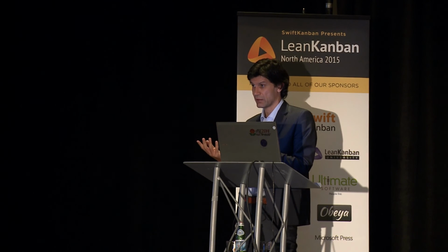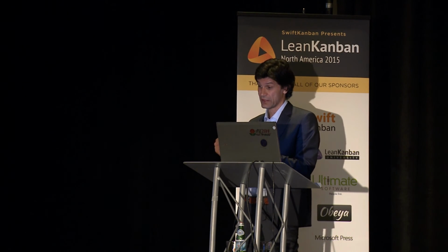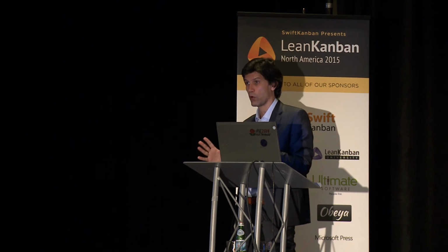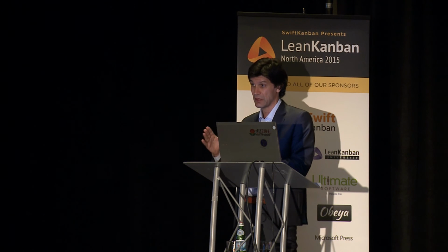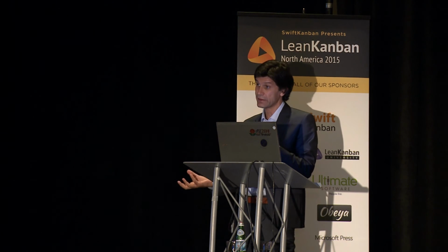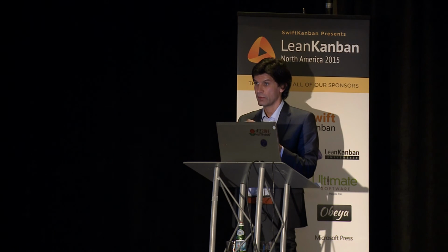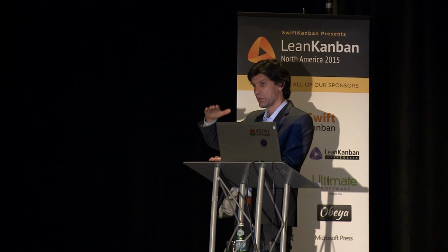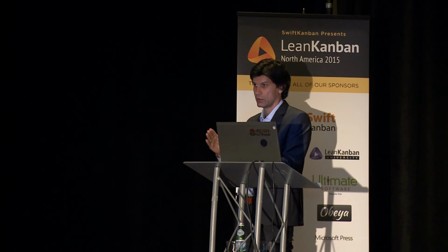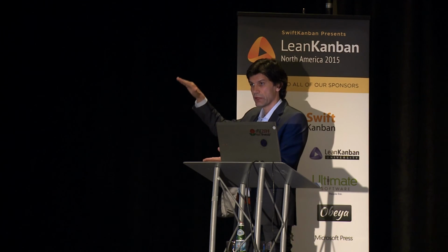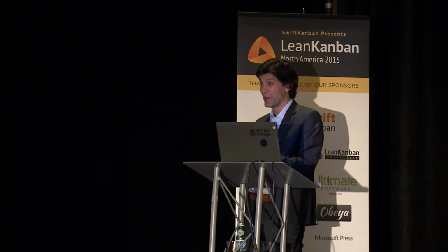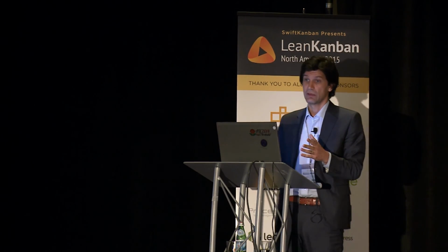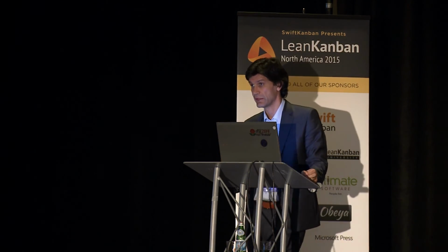Depending which is faster, right? In my practice it could be faster to analyze this epic alone. I break it down into user stories, then into acceptance tests, and then just add the new numbers, the new part of the scope, to the estimate. In this case, the estimate grows, not linearly, but it grows a bit, right? So we have the estimate as our baseline, and on top of that, we add everything new, right? Hopefully, there will be no 10 or 20 new epics added. So did I answer your question?